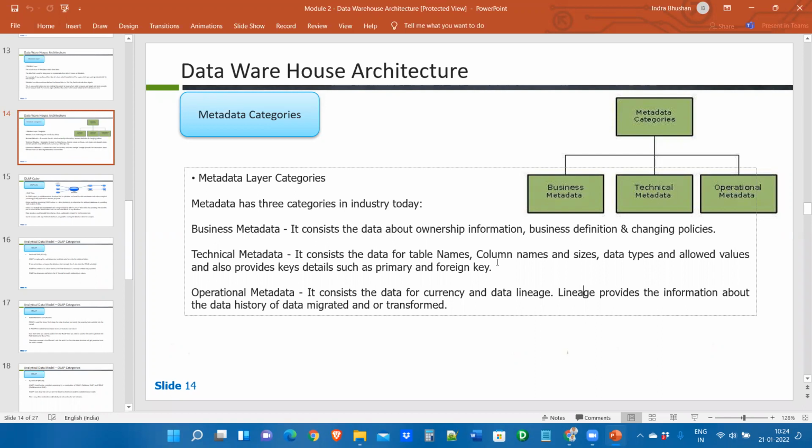One project manager comes from the business who sponsored and funded the project, called the business project manager, and one project manager who executes the project. You got my point? So a project will have stakeholder and sponsor details as well as the project's own organization chart. Clear?